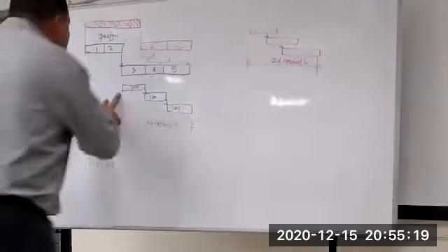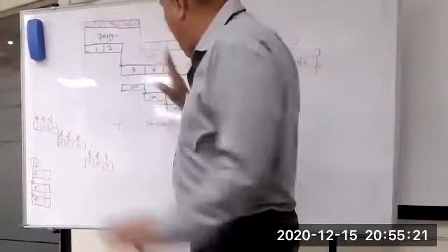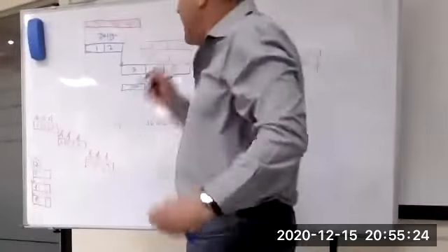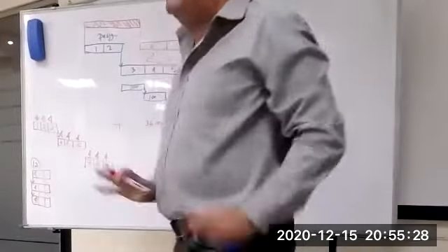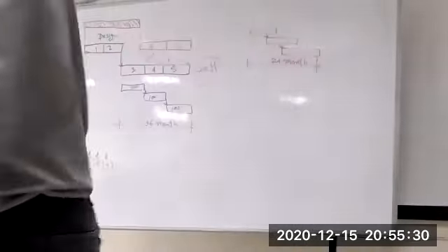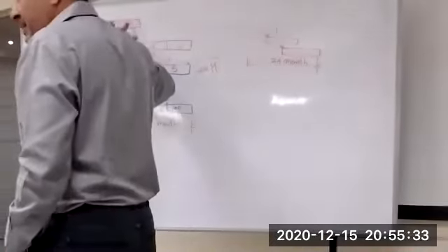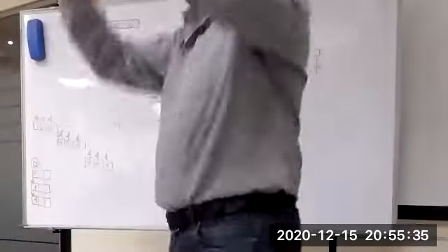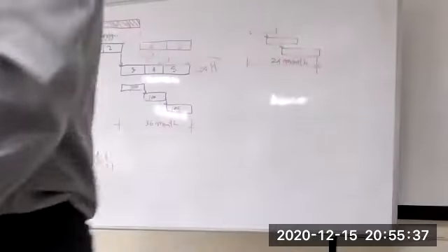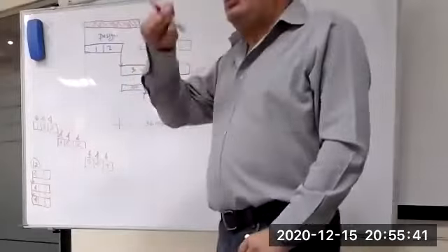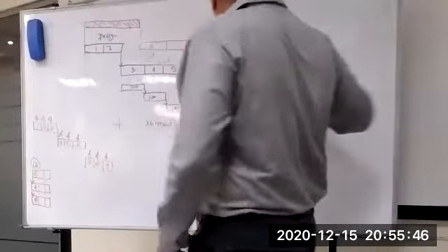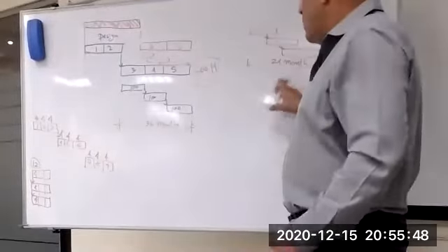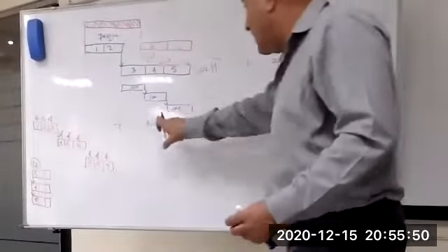In a fast tracking project, before even the tendering stage, we were planning for 3 years with a 600 million project. After 2 years, 3 years pass, the guy comes, and the budget is still 600. The consequences are quality issues, because the 600 is the same.